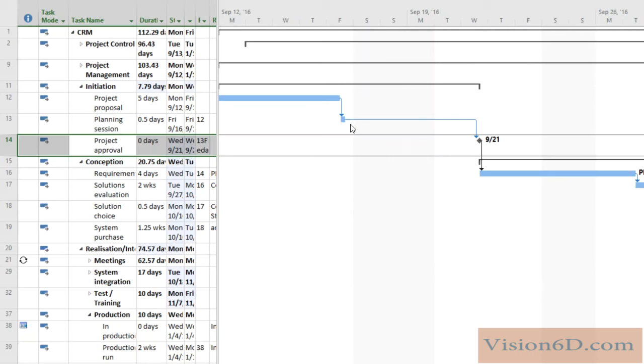And you see here, the project approval has been moved by 5 days. If now we count in reality what was done, you see there is 1 day, second, third, fourth, and the fifth. But you see that in between are gray days. So it means that these are elapsed times.